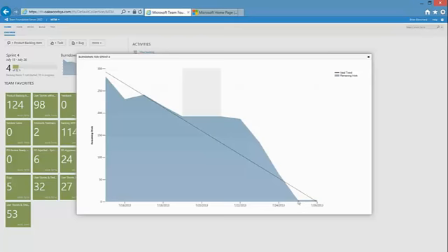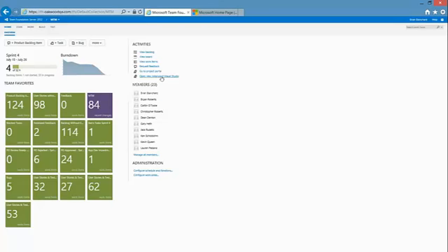Yep, we always have a goal in our development team of concluding before the final day of our sprint, so that we have a little bit of time to do some testing diligence along with our test team, get the developers reintegrated there, and help the testers find any of the little niche features that maybe they're having trouble tracking down. And you can see we accomplished that here as well. So definitely that Agile planning tooling in Team Foundation Server is working well for us.